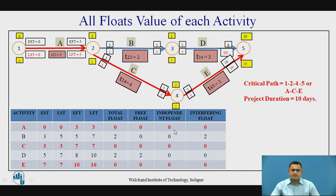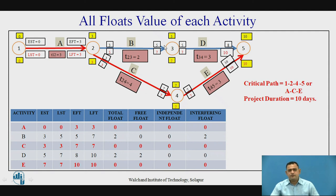For activity B, which is non-critical: total float = LFT minus EFT = 5 minus 3 = 2, meaning the activity can be delayed by a maximum of 2 days without affecting overall project duration. Free float: EST of succeeding activity D is 5, minus EFT of B which is 5, giving 5 minus 5 = 0. The independent float is also 0. But the interfering float = total float minus free float = 2 minus 0 = 2.